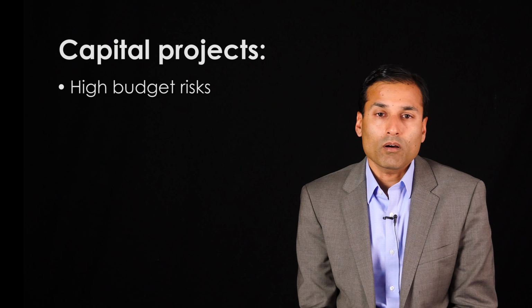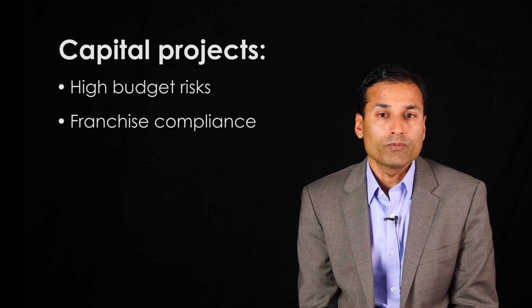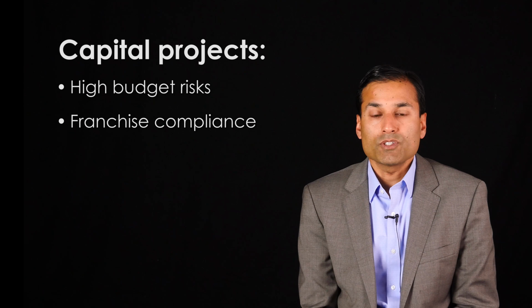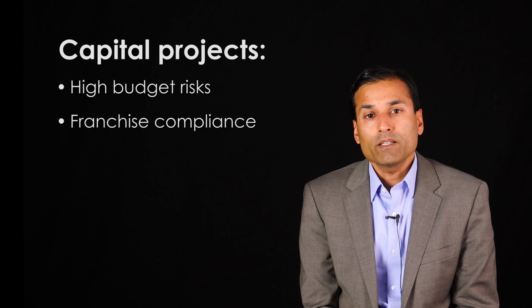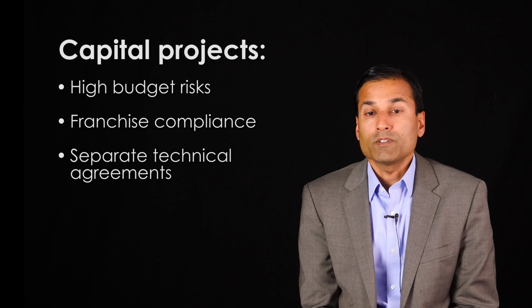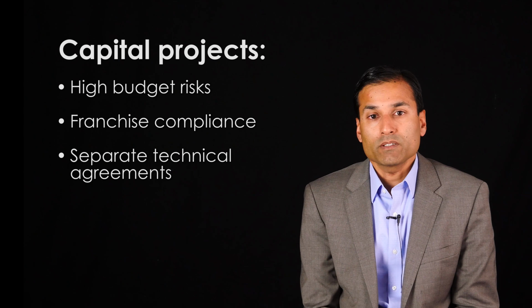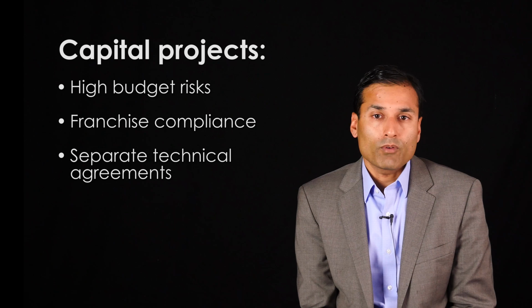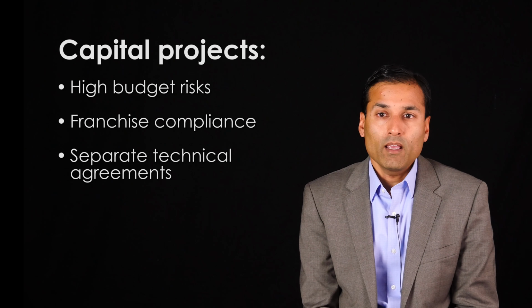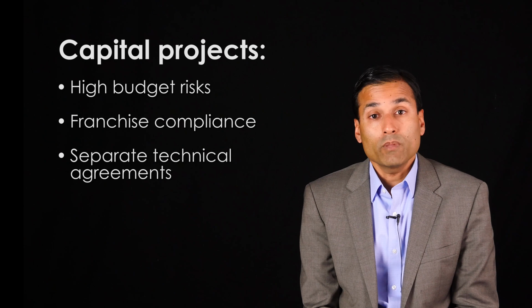In addition, there are issues of franchise compliance. If you have a franchise agreement with a certain flag, you'll need approvals from the franchisor as to capital projects and budgets and the type of finishes that you're having. And finally, you may have separate technical agreements with various consultants as well as the contractor in finishing those projects. Those are agreements that you should have reviewed by an attorney experienced in those areas to make sure they are done properly and to prevent costs from going beyond the budget.